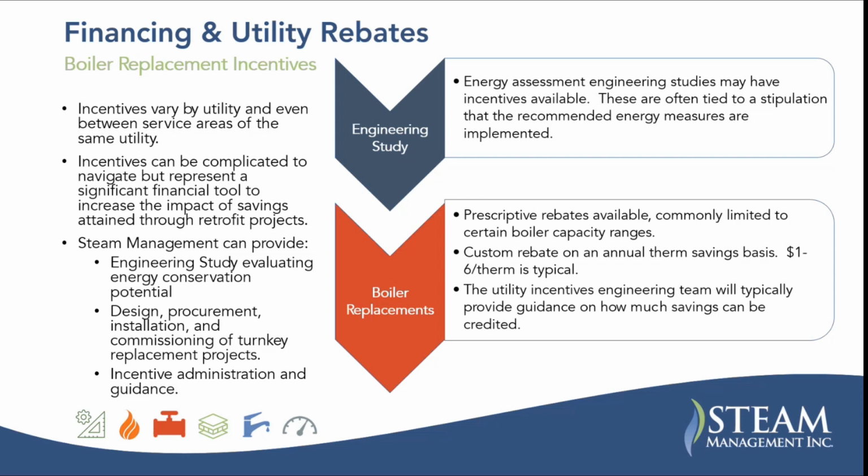The rebates that are actually available are going to be for the engineering study. This is generally speaking. You can't just say that this is the same for all utilities in all situations, but this is kind of in general. There may be an incentive available for the engineering study. These are often tied to a stipulation that the measure is implemented, so that you do have to move forward with a boiler replacement project to get the incentive.